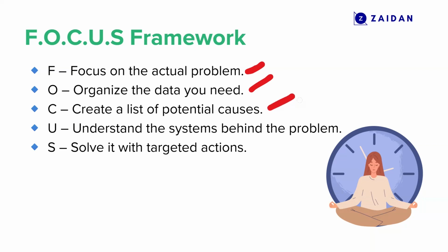C stands for create a list of possible causes. Now, here you may brainstorm all potential contributing factors to the problem. Use tools like Fishbone Diagram, 5 Whys, or even team whiteboarding sessions. Include people, process, tools, timelines, and external factors as possible causes.